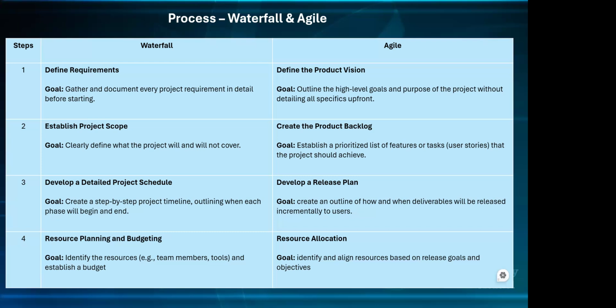For the design of the feature that we want to initially release, we want the designer maybe 4 weeks to do the design, make sure everything is shared. There's definitely going to be feedback on it and all that. The designer has done what he needs to do, sign off within 4 weeks. And then for development, we're looking at maybe 6 weeks. For testing, we're looking at maybe another 5 or 6 weeks, and then maybe 2 or 3 weeks for deployment. That is an example of the schedule that needs to be in place.